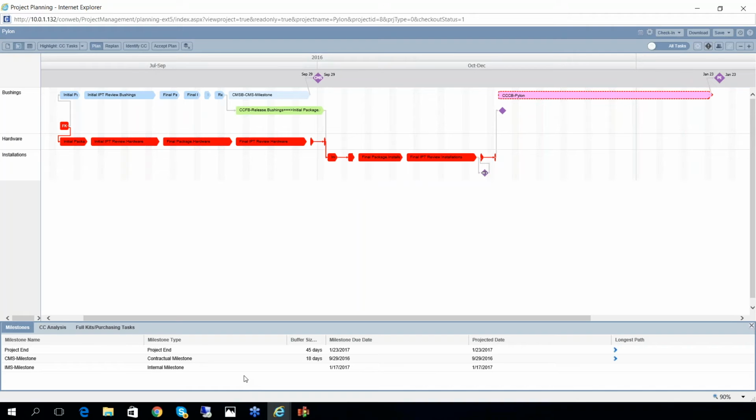Because at the most, what can change is the durations. A lot of these dependencies will not change. All the dependency changes that will happen will be at the subtask level or at the checklist level. And so therefore, this critical path is not going to fluctuate and keep oscillating from one critical path to the next critical path. This critical path is going to remain relatively stable.